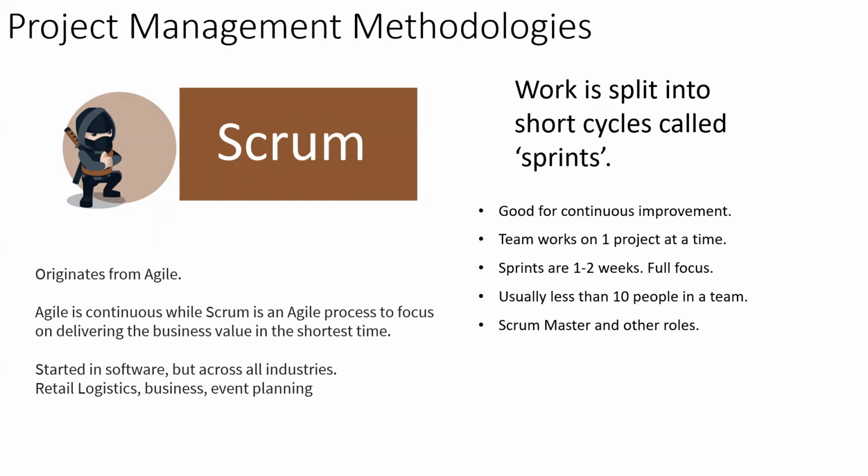Sorry about that. Okay, so it's great for continuous improvement. It's a project management method which really takes your team to focus fully on the task at hand. So all the work scope is broken up into little bits, those sprints, and then you work on one sprint at a time, which lasts 1 to 2 weeks. But you can't have a person working on 2 different sprints. The point is to focus fully on that task at hand. You meet every morning, you have an update, and then you get on it.